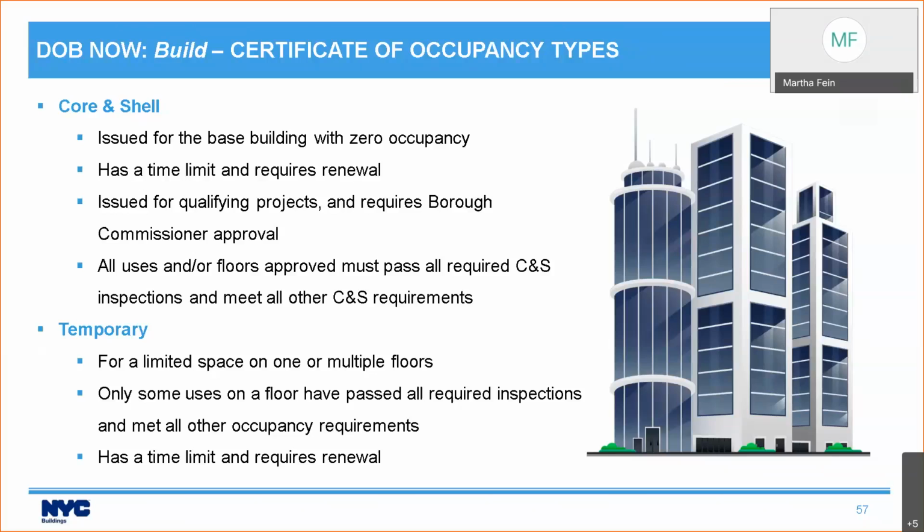Temporary occupancy is not new. It's exactly the same as it was, and it's for a limited space on one or multiple floors. It is what you should be using when only some uses on a floor have passed all required inspections and met all the other occupancy requirements. Temporary occupancy has a time limit and it does require renewal.